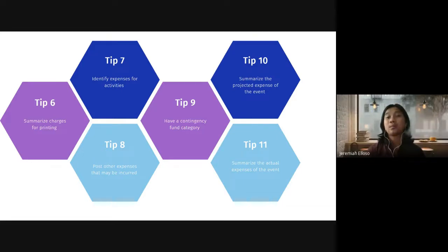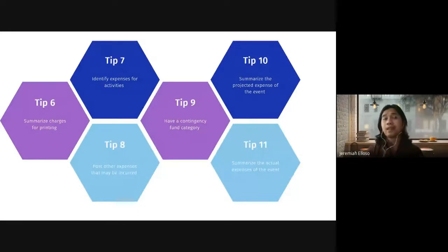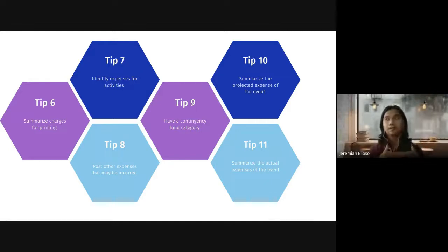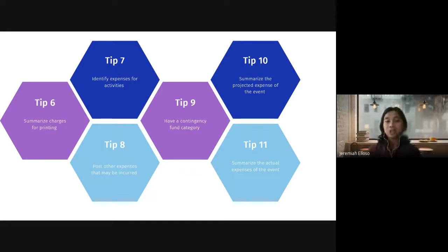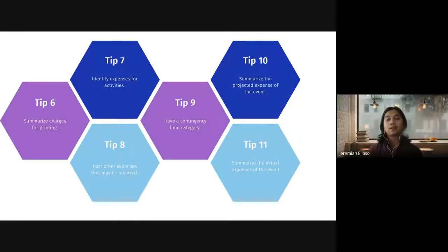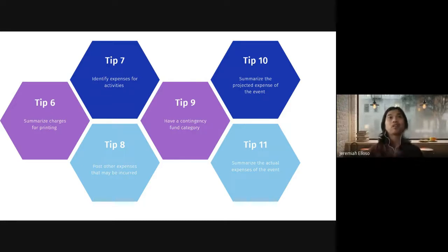Tip ten: summarize the projected expenses of the event. From time to time, or at the end of the event, liquidate all expenses and review whether you met the financial objectives — are you within budget, were you able to get discounts, or are you over budget? This is part of post-event activities as an event manager. Tip eleven: summarize the actual expenses of the event — review the budgeted or forecasted figures versus the actual, and identify whether you have savings or are over budget.